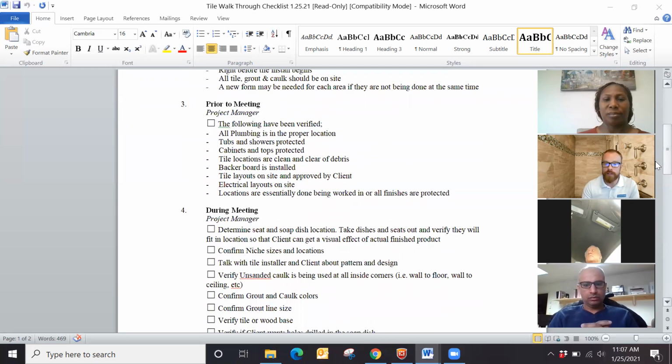So prior to the meeting, we've got all the plumbing roughed in, and everything is installed out of the way. Where we're going to be working is all protected. Where we might need some blocking is installed. And then we have a couple of the boxes decrated in case we start needing to put together and actually lay out the tile. So we want drawings ready, so that as soon as the meeting commences, we can locate all items according to the layout.